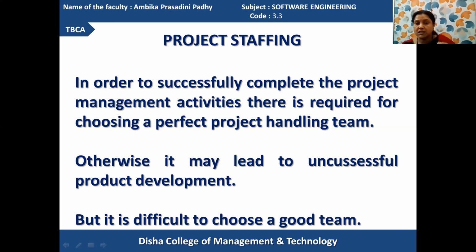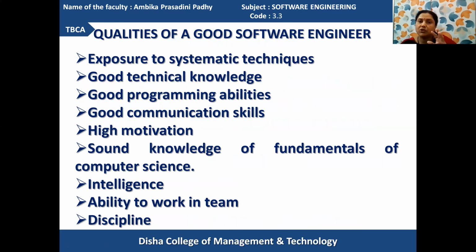Got it? And for successful development of the product, proper team member selection is very important. For that, project staffing is important. When the project staffing is prepared, the skills present in the software developers or software engineers are identified. According to their skills, they will be allocated different responsibilities. In which area they are expert, in which area they are perfect to do their work, accordingly they will be provided the responsibilities and assignments to be performed.